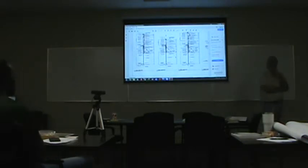So I get the steel rack. I'm not thinking ahead. I'm not thinking ahead at all. So the next thing I got to do is what? Get the metal stud guy down there, right? Now, if I didn't have a schedule, didn't know what I was doing, my schedule's going to help me to anticipate where I need to be making phone calls, where I need to be scheduling things ahead of time. Because I can't call my metal stud guy on Saturday at 10:30 and expect him to be there on Monday, can I? That's not reasonable. Okay, it's not reasonable. It's not reality.